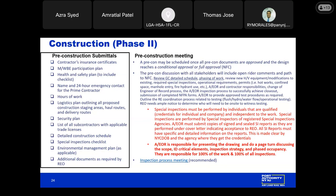It's very critical that the contractor review it and fill it out properly prior to submitting the health and safety plan. Oftentimes, we'll see that certain elements of the HASP were omitted, which is only going to lead to a rejected submittal, and this leads to delays in having a full pre-con approval, which will lead to delays in mobilizing and starting construction. And if I could just add on the contractor's insurance certificate, we also look for expiration dates, making sure that they don't work with expired certificates.